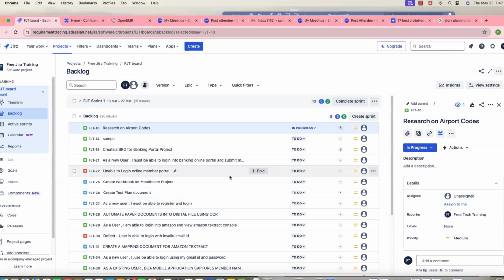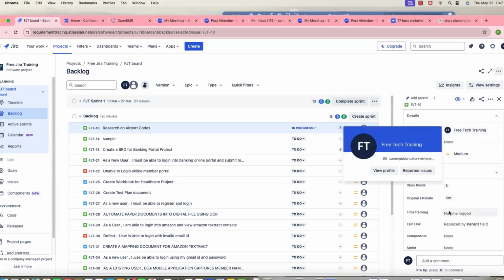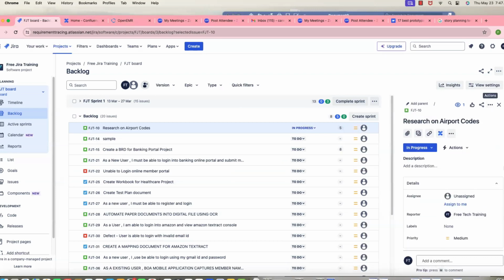You mean, Pradeepa, both developing and testing will happen for that story points estimation? Right, a combination of both. If it is exceeding 13, then we are going to break that. So development is a separate story, and your name is not there. For testing and implementation, maybe it is split. A 13 pointer is split into 8 and 5. In the development story, only his name is there, your name is not even there. For the testing story, your name and his name are there. It's not that every user story must have your name.